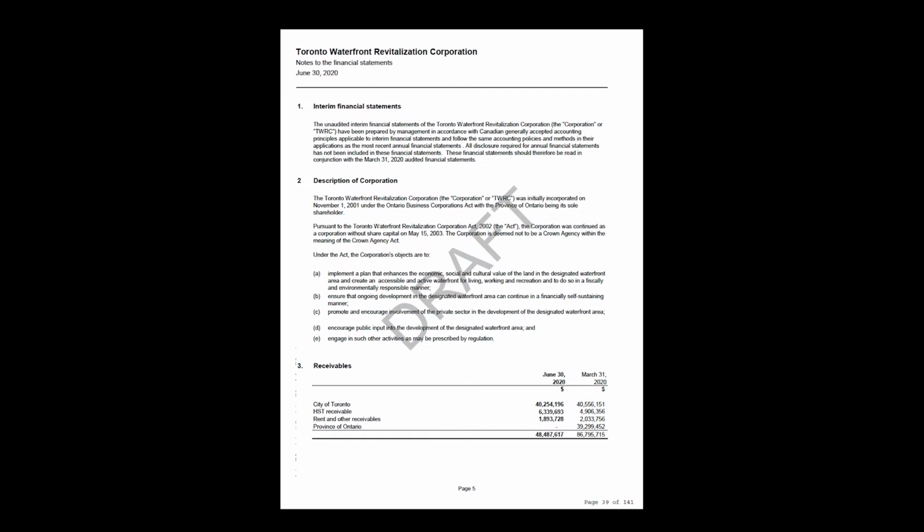Okay. And Michael, this is typical for most of the assets and infrastructure that Waterfront Toronto is responsible for building. Once it's completed and has gone through a warranty maintenance period, it is transferred over to the city, and you'll see that transfer come off our books and our assets under development balance decrease. Got it. Thanks so much. Thank you. Nothing else from me.